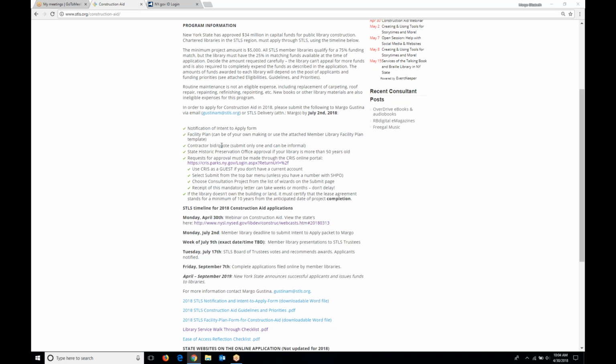You do need to come to the application with a contractor bid or quote. You only need to submit one to me, and it can be informal. But knowing that this will be the amount of money that your allocation is based on, you'll want to get a contractor bid that's pretty accurate. So even though you're only submitting one to me, you may still want to, during this phase of the application process, get as many as you can. So you have a really good idea of how much the project will cost before you make the request.